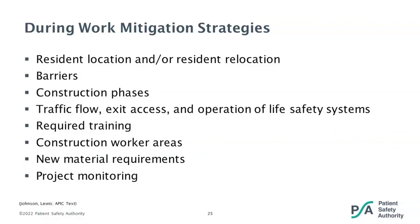While the actual construction work is occurring, we have a different set of mitigation strategies to consider. This includes the location of residents or if they will need to be relocated, if barriers need to be used and what type you will put in place, construction phases and how long each phase will take, what different types of work will take place during each phase, traffic flow, exit access, and operation of life safety systems. Also, any required training — considering both construction and facility staff — construction worker areas, new material requirements, and project monitoring.